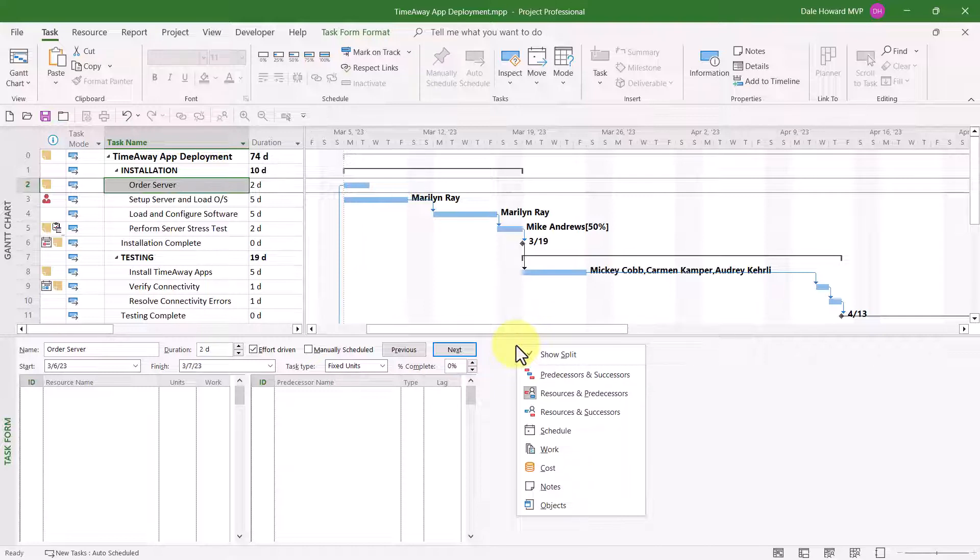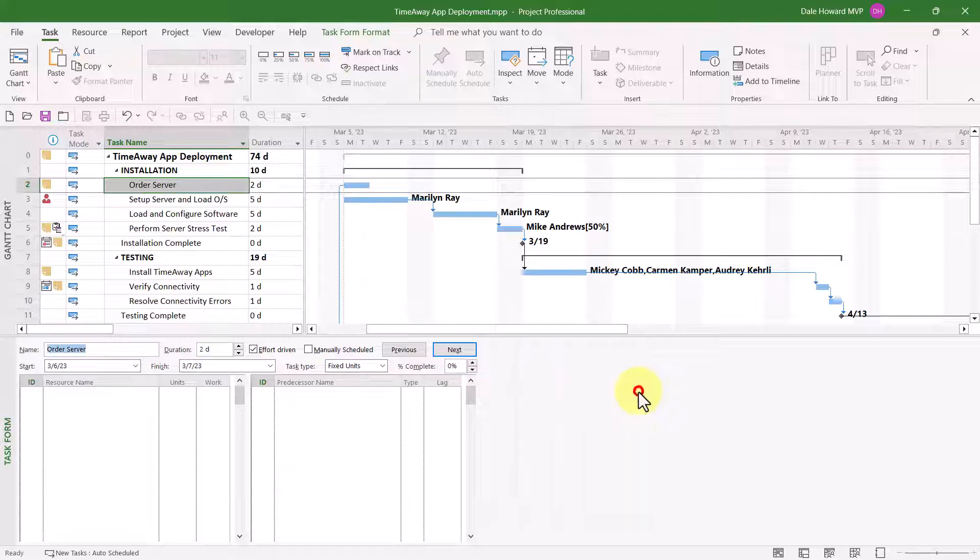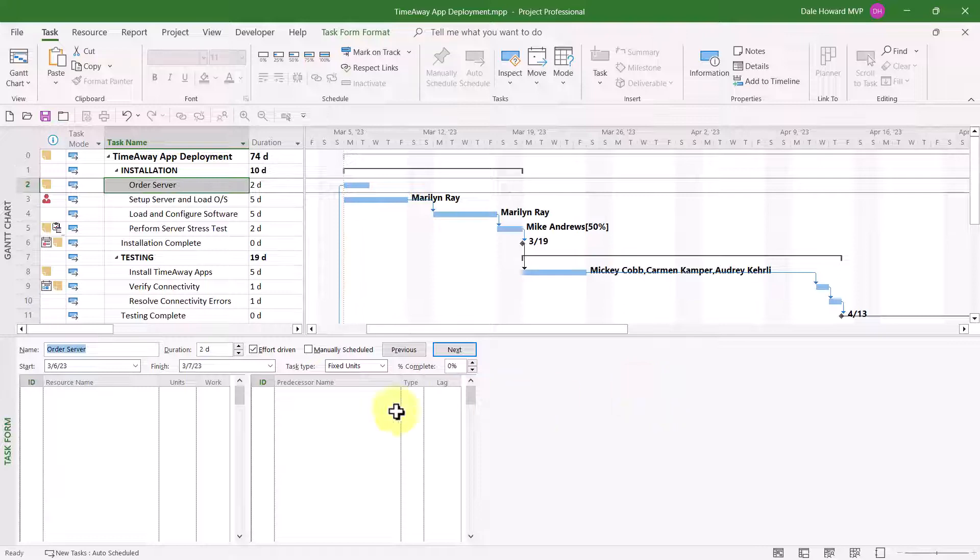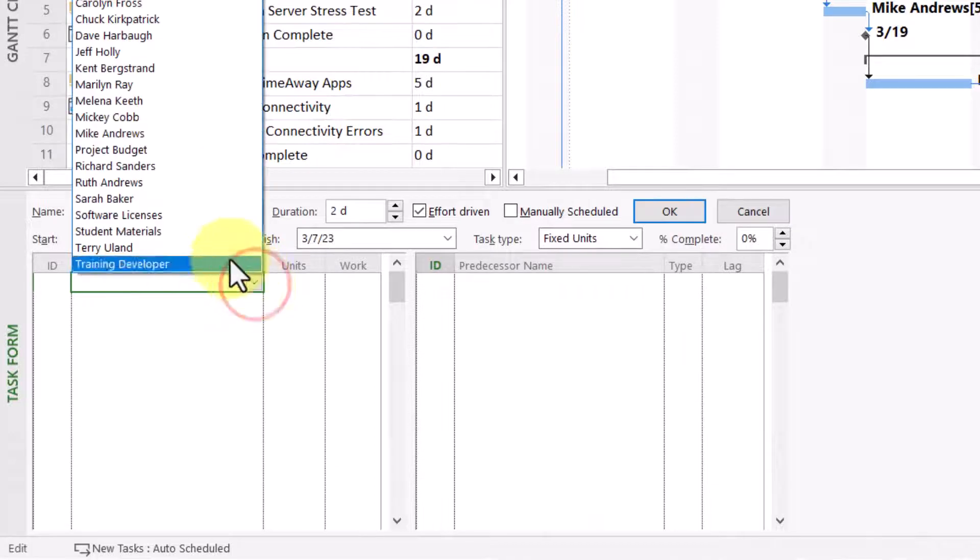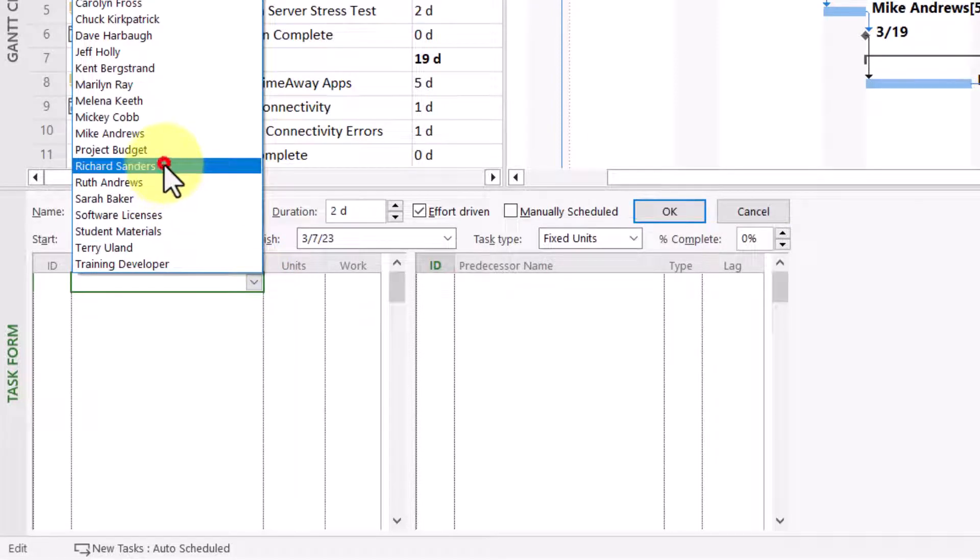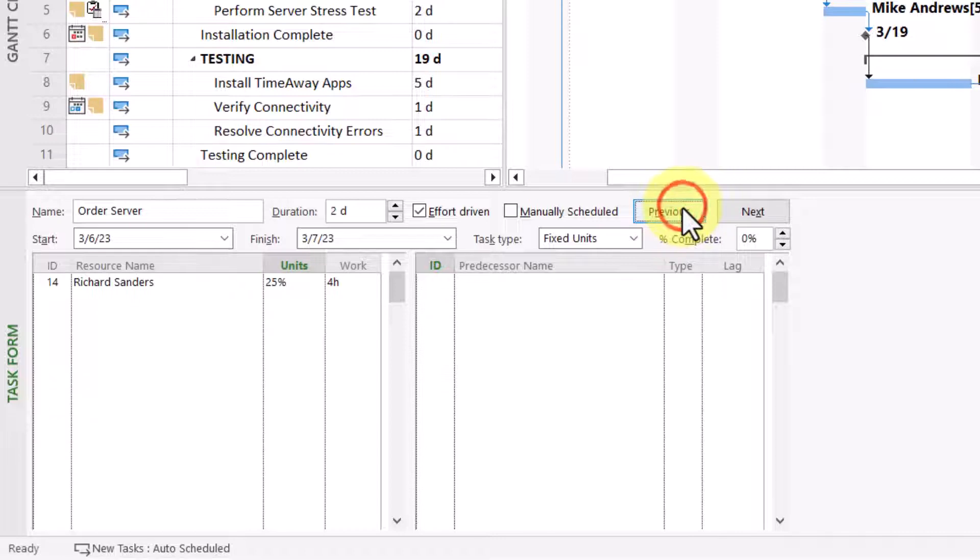There are the sets of details available for the task form view. A set of details is simply a set of fields and columns that are displayed in the task form view. The default set of details is known as Resources and Predecessors. This is the set of details you can use for assigning resources to tasks. For example, for the task order server, I'd like to assign Richard Sanders. He's going to work about one-quarter time or 25% units. When I click the OK button, Richard is assigned to the task.